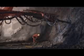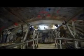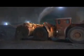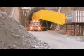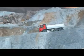Some 2,500 people are engaged working on the project, and the actual boring of the tunnel through the mountain has moved forward at a speed of up to 25 meters a day. One of the biggest challenges is to remove the 13.3 million cubic meters of crushed rock that is drilled out of the mountain. This corresponds to the combined volume of the 5 Egyptian Cheops pyramids. Umberto Salvagni, who is the supervisor of the 20-kilometer-long stretch between Camorino and Vezia, can tell us more about how the work is progressing.